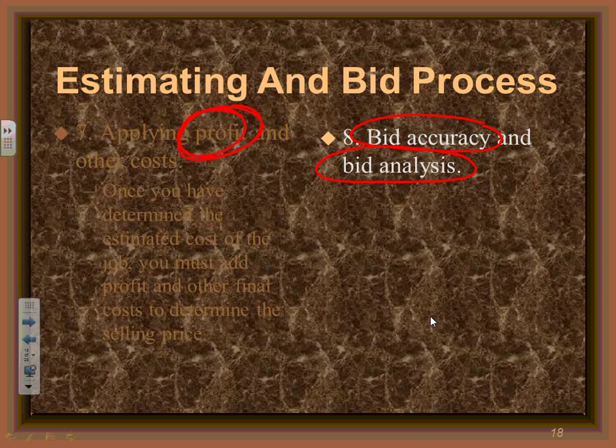That's when you put together a very, very competent group of people, and the software will give you, as I told you guys, a dollar per square foot value. You get what percentage your labor is of your overall cost, and the material of your overall cost. All these values, guys, percentages and factors, the software will give to you, and then you as a project manager look at them and decide, yep, I am pretty confident that my bid is accurate. So you have to analyze your bid in order to come up with accuracy, right?